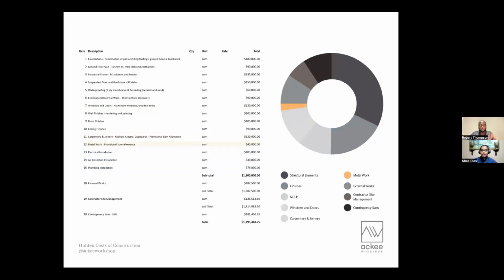But also included in the hard costs are the external works. So when you have to pay for work to be done for your driveway, for any planters, stuff like that, stuff done outside of the house but within the site, it's also considered a hard cost. Another big cost that a lot of people don't think about is your boundary wall as well. As an external cost, that's usually very, very high. Yes, especially on a hillside. Right, and the final hard cost we're going to look at is the site management cost that the contractor would give you.